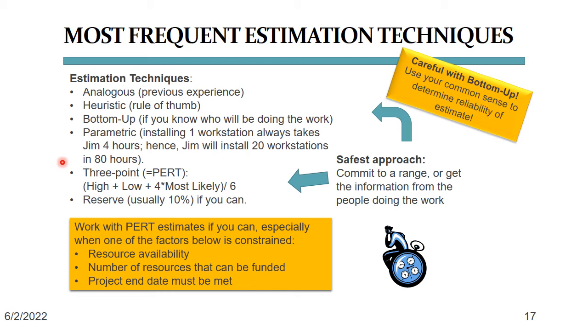But instead of only thinking about Rajiv, how about asking Rajiv instead how long he estimates the work will take him? That would be called bottom-up estimating. Bottom-up estimating is one of the most reliable methods. Here, project managers reach out to the people actually doing the work and ask for their estimate, how long a task will take them to complete. But then bottom-up estimating comes with its own problems.